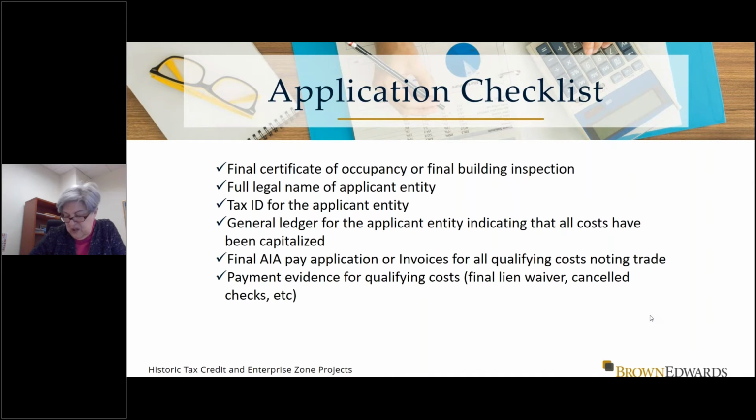Interestingly, one of the things that I had run into that's not qualified is an awning. And a lot of buildings do have it, especially a lot of historic buildings. And I had one that was an art gallery down in Shockoe Bottom in Richmond, and they put in a sun sensitive awning that would rise and fall according to the sunlight that was available to protect the artwork inside. It was all wired into the building, and it had a light metal frame, and the awning itself was there to protect it. We had to show photos and show how it was wired into the building and send a copy of the invoice indicating that it was wired into the building and why to get it approved. But we did. So that was because it was very expensive, and that was a very happy thing for our clients.